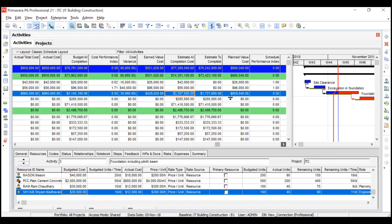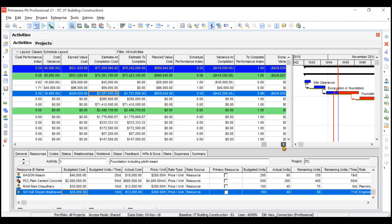Estimate to Complete means how much remaining cost is pending for the activity to complete. For the first two activities, since they are already completed, there is nothing pending. For the third activity, the formula is: Estimate at Completion minus Actual Cost already incurred. This shows how much cost is still pending for the activity to finish.